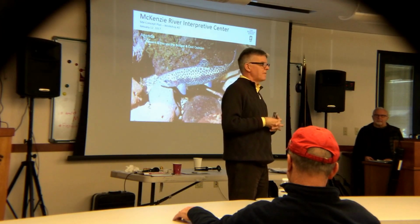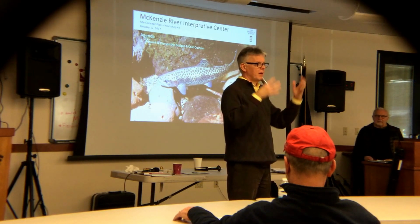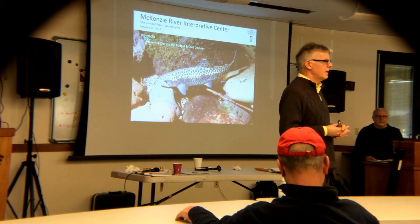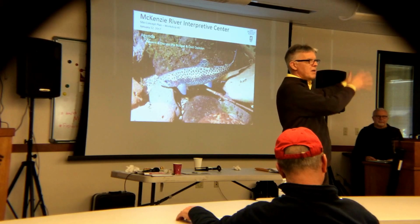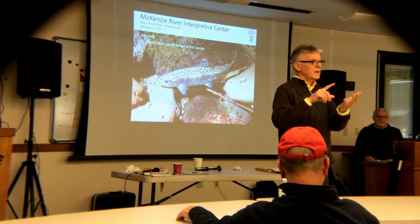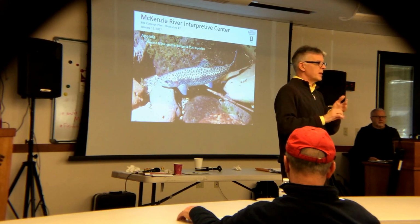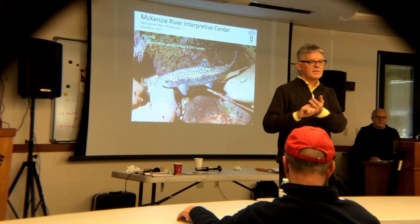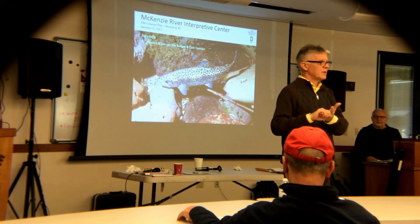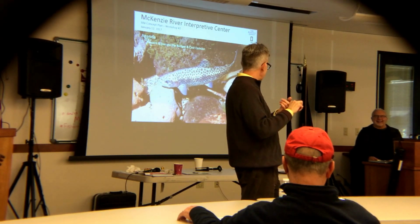As a reference, depending on how much fundraising dollars want to cover those other costs, that can be 40 to 50% of the value of the building and exhibit cost. So we usually have these buckets called hard cost, which is the construction cost, and soft cost, which are things like: you may hire a staff and administrator, so you're going to have your own project management, operational, organizational cost. There are design fees and planning fees. There are permits and environmental or entitlement steps you're going to have to go through. There's a phrase, furniture and fixtures, FF&E.